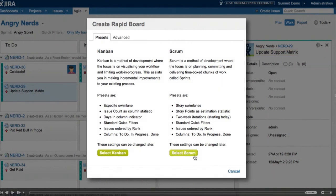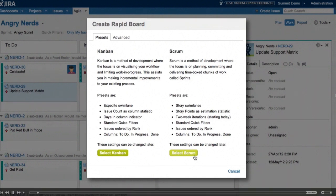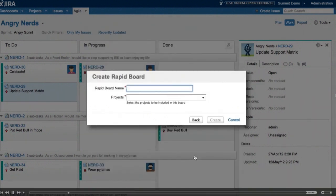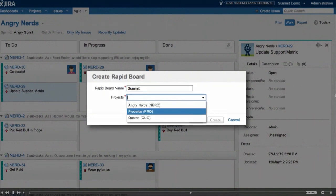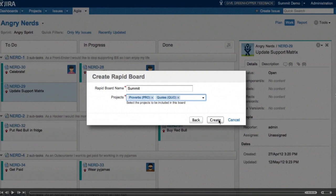With scrum, the swim lanes will be by story. Our estimation statistic will be story points, and we get a number of quick filters which I'm going to talk about later. So we'll select scrum. We get to name our board. I'm going to call it Summit, and because this team works on multiple JIRA projects, we're going to add both of those here.